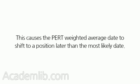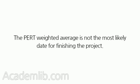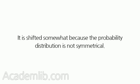This causes the PERT weighted average date to shift to a position later than the most likely date. The PERT weighted average is not the most likely date for finishing the project. It is shifted somewhat because the probability distribution is not symmetrical.